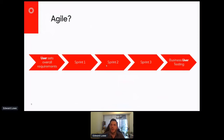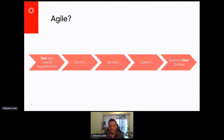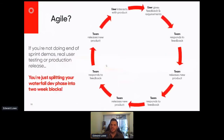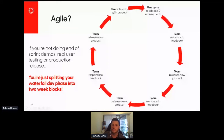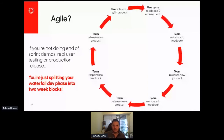If I restate that as the loop, we have those initial requirements, then the team responds to feedback and releases a new product, again and again — and it's not until you've been around the whole loop that the user actually interacts with the product. That's not a very tight loop — that's actually quite loose. I would argue that unless you're doing real demos to real users at the end of each sprint, and ideally releasing into production, all you've really done is split a waterfall dev phase into two-week blocks.